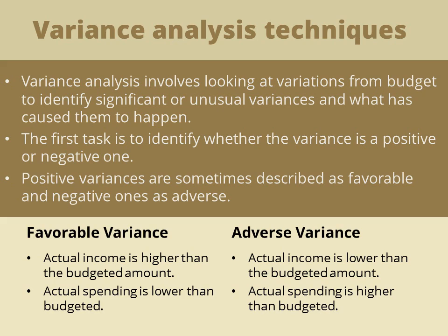Variance analysis involves looking at variations from the budget to identify significant or unusual variances and their causes. This helps us plan the next phase. The first task is to identify whether the variance is a positive or negative one. Positive variances are sometimes described as favorable and negative ones as adverse.